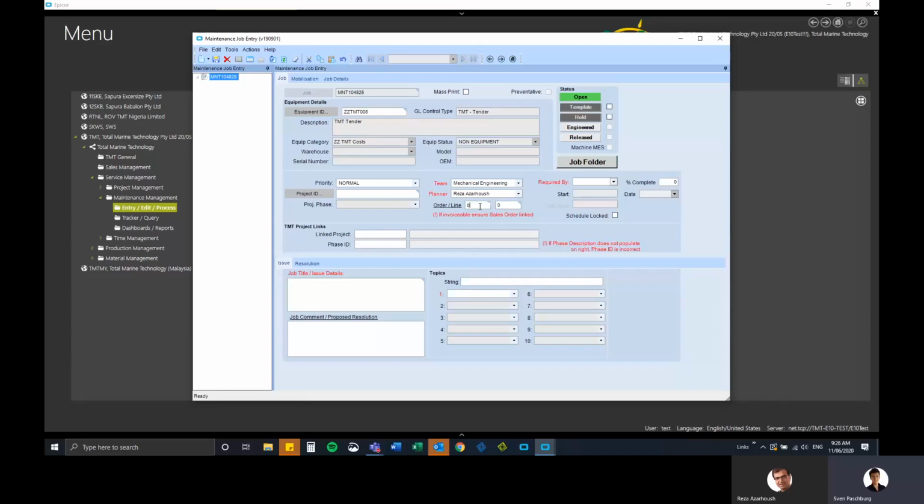So we do use maintenance jobs mainly for mobilization and demobilization from Mark Harris's tools, and they're linked to a sales order, so that when that job is finished, finance knows what sales order it's linked to, and they can take the cost of the job, which currently sits in the maintenance accounts, and then go and invoice the customer for it, right? So this was something that we added in. So just be wary that if your job is linked to a sales order, when you go and close it at the end, you need to tell finance so that they know to take the cost out of the separate part of the system and go and invoice for that, right? It's not Epicor standard workflow.